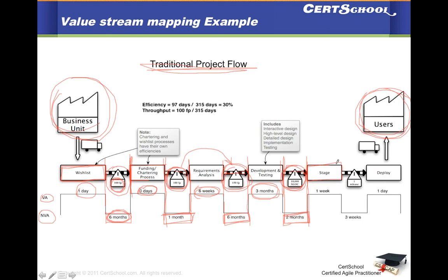So by the time you're ready to deploy it on staging, you spend 2 months. And then once the skilled people start deploying it, you spend about a week to actually get that whole environment up and running with your 10,000 lines of code. That 1 week is value add time. Once you finish staging, you have a release bundle.